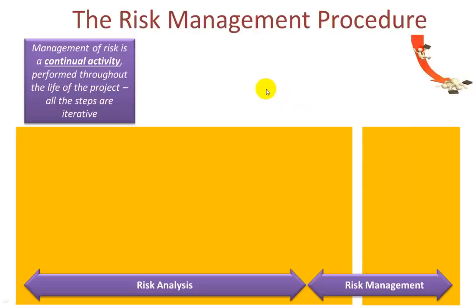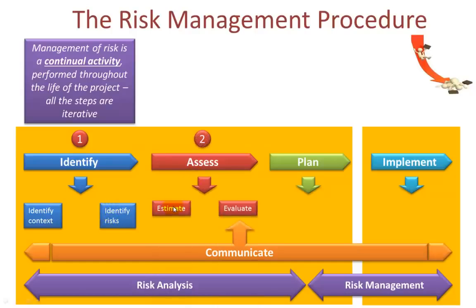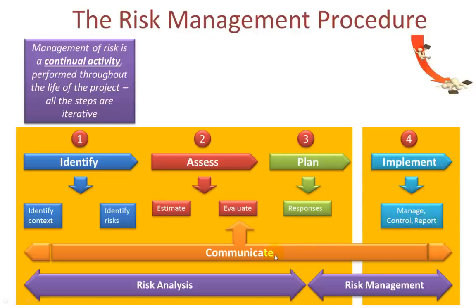Let's look at the risk management procedure. The management of risk is a continual activity performed throughout the life of the project; all of these steps are iterative. I've redrawn the diagram as a linear flow, split into risk analysis and risk management. There are actually five steps, with the communicate step running in parallel since the communication of risk needs to occur throughout the project. Step one is identify — where we identify the context of each risk and the risk itself. In the assess step, we estimate the risk and evaluate it. In the planning step, we determine what responses are appropriate. And in the implement step, we manage such responses, control and report against them. Communicate is a continuous activity running through steps one to four.